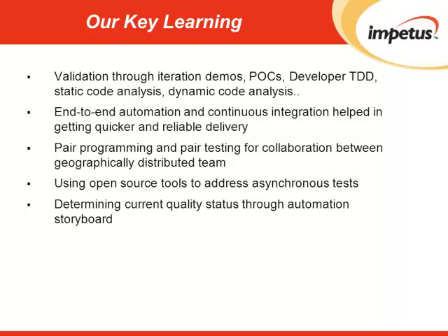Additionally, adding and executing automated tests with continuous integration helped in discovering issues that would have been unintentionally affected by the current sprint's updates. We also actively worked with our customer to create acceptance tests and then automated them. We used the number or percent of successful acceptance test cases to determine our progress on the project.